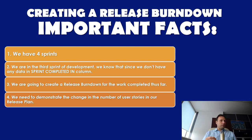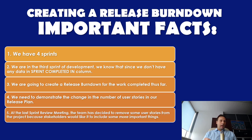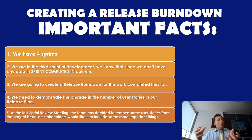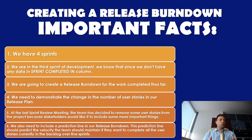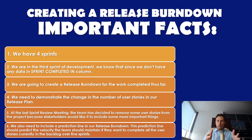We need to demonstrate the change in number of user stories in our release plan. At the last sprint review meeting, the team has decided to remove some user stories from the project because stakeholders would like it to include some more important things. We also need to include a prediction line in our release burndown, and this prediction line should predict the velocity the team should maintain if they want to complete all the user stories currently in the backlog over five sprints.